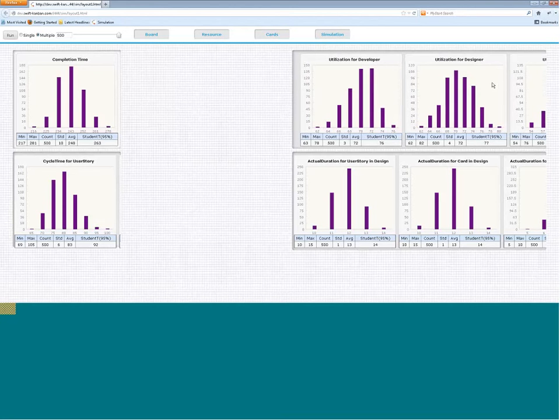So I got a very evenly distributed utilization, and one of the things that most of the agile methods would encourage is to have this, so that people are not getting bottlenecked, so that you are able to take variations and absorb some level of spikes. So it's a very optimal planning that we are able to do based on this kind of a simulation pattern.